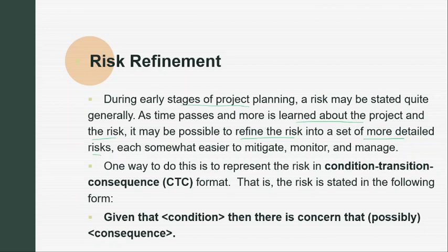And here, how we represent this risk is using CTC. CTC means the condition is there, so what is the condition, and then the transition, and then what are the consequences. This is one way to represent the risk during the project refinement.